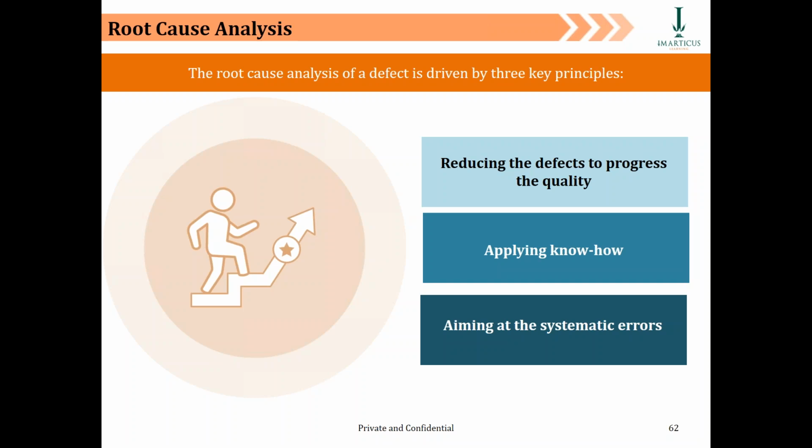That's the quantity part. The quality part is when you rectify your system like that, those errors just go away, and then what comes up as a bug is something which you are again analyzing. And the good thing is that it helps you to improve or enhance the quality of the technical inventory in your system, because you do 3 root causes, let's say, in a month. Each root cause was actually bringing 20 errors. So in one stroke you eliminate 60 errors every month, because if you would have let those errors be there, they would have given birth to 20 errors every month.